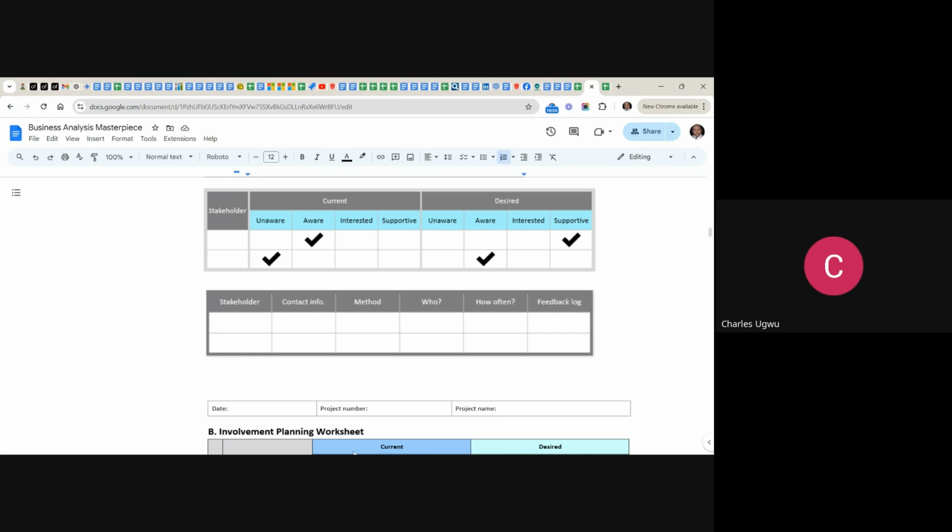Your little project, which is the center of your world in that company, might be like a grain to such stakeholders. Some of these stakeholders have their legs in so many big projects going on in the organization. So when you start calling them every day, sending them messages, you are bugging them. They don't want that. All they want is that every week, you send them their status report so that they will know where you are. And in this case, it can be every week.